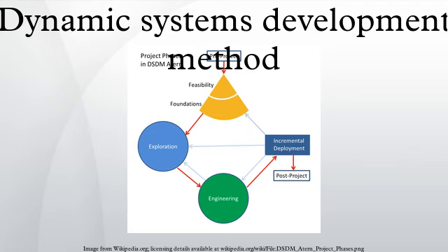The deliverables for this stage are a business area definition that describes the context of the project within the company, a system architecture definition that provides an initial global architecture of the IS under development, together with a development plan that outlines the most important steps in the development process. At the base of these last two documents there is the prioritized requirements list. This list states all the requirements for the system, organized according to the MoSCoW principle. And last, the risk log is updated with the facts that have been identified during this phase of DSDM.